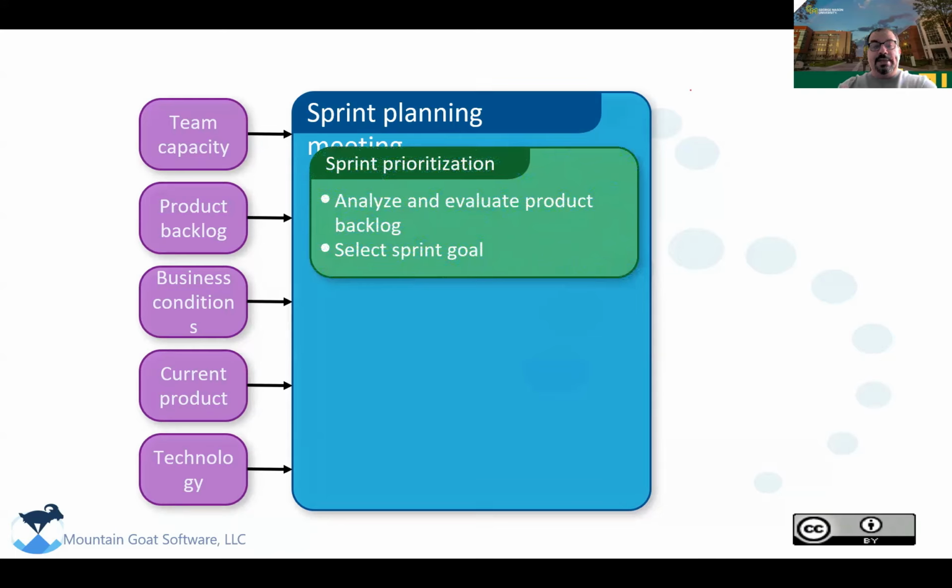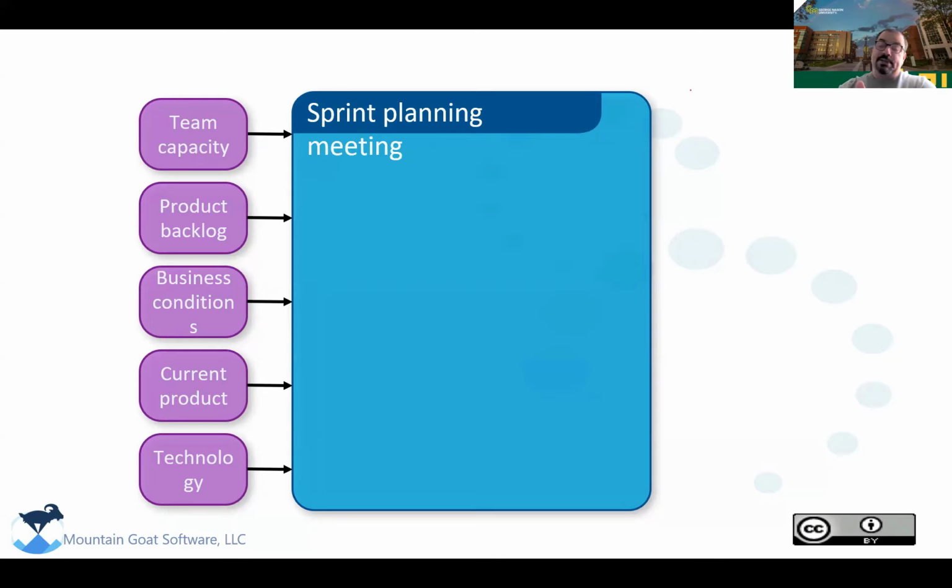you have a meeting where you see, okay, what's in my team capacity? Who is involved in this sprint? I have a database administrator, I don't have. I have a security guy, I don't have. Okay. So the second one is check the product backlog. Okay. And check what's the goal of this sprint. Okay. And the PO says, okay, the goal of the sprint is A or is B or is C.